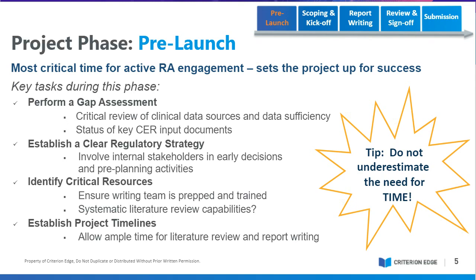First of all, where do you stand? Perform a gap assessment. Where do your documents stand? Critical review of clinical data sources. Are you worried about data sufficiency? Status of, as I said, your key CER input documents. Establish a clear regulatory strategy based upon all that you know. Involve internal stakeholders in those early decisions and pre-planning activities.